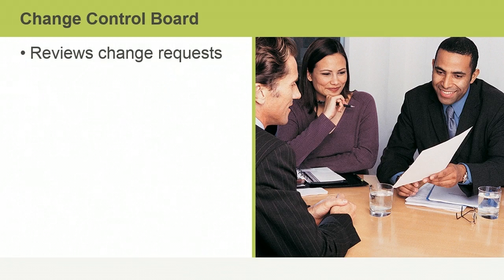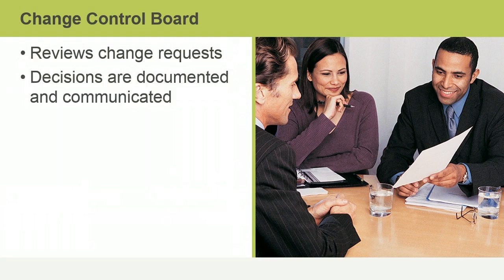Depending on your organization and the complexity of your project, you may have a formal change control board. A change control board reviews change requests that exceed the project manager's authority level. All change control board decisions are documented and communicated to stakeholders.